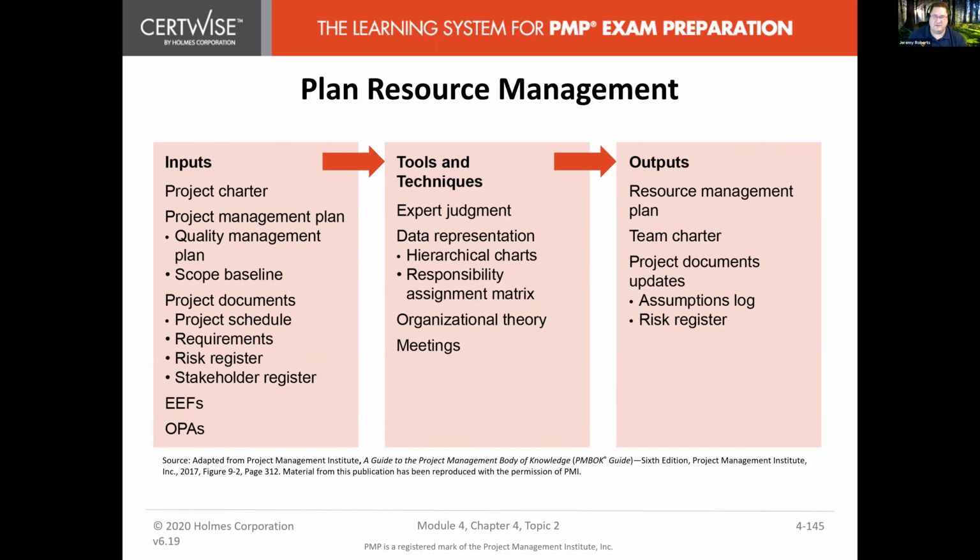So now into those 47 process activities, right? So plan resource management. So of course, in order to plan for our resource management or create this plan, we need our project charter. You know, if we're going to be repairing a piece of equipment, well, our project charter is going to say that, so we don't need to think of, let's say, getting a backhoe, construction equipment. We don't need that because we're just fixing something, or we're redesigning a process for manufacturing.